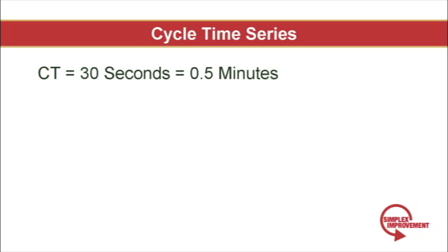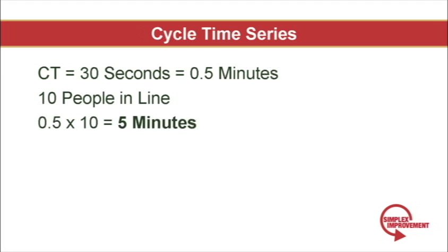So if I want to know how long I'll wait in line in this steady state system, it's 0.5 minutes per customer times 10 customers in line. Little's Law shows that I can expect to wait 5 minutes if I'm the 10th person in line. This is the relationship between cycle time and lead time.